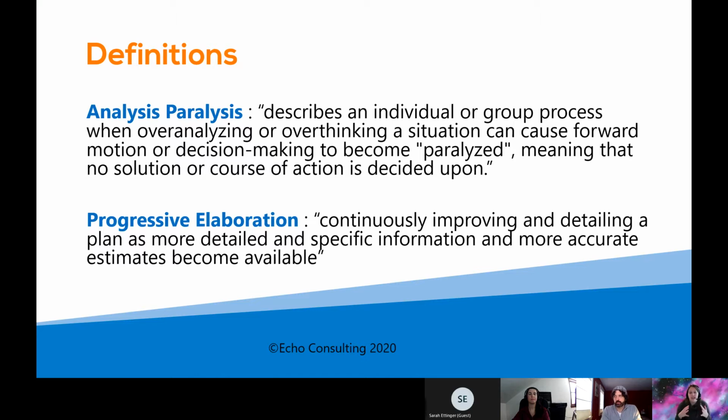But it's this idea that if your team or you are feeling like, I don't have enough information yet, and that information is not available until you dig in deeper, start by giving yourself a threshold of 50%. And then usually when I get to the done, like planning, I add some time to it. Now my target is 75 to 80%, depending on the organization's maturity, like how familiar I am with the project that I'm taking on.